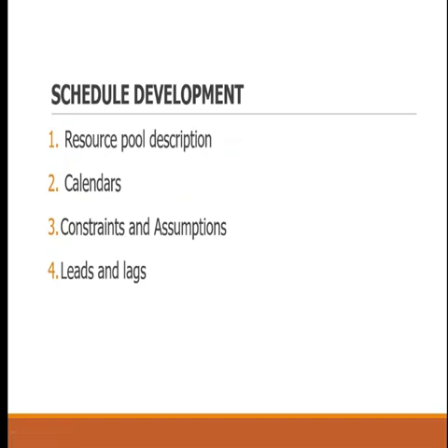You did a decking. You don't just finish a decking and start putting blocks on the decking. You will undeck the decking. What you should do is allow the decking to cake. Allow it to form. You have to wait until 30 days. All right? The structure should be strong before you can continue your building and put your roof. That is how it is.